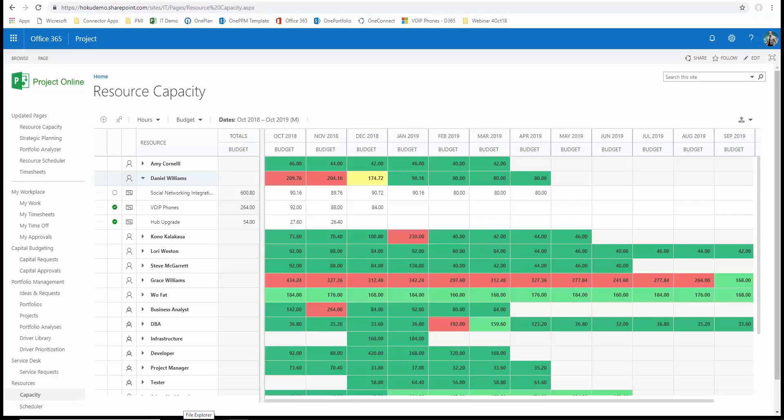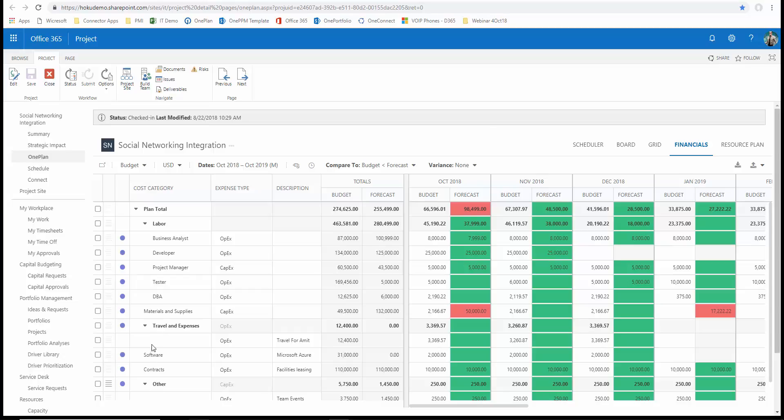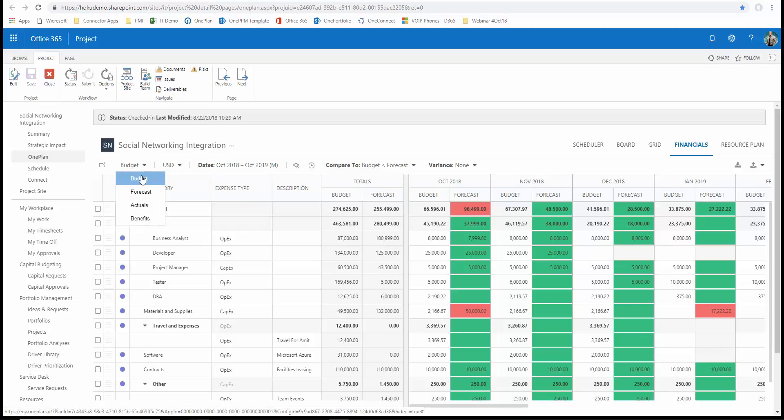To that, we also can add financial planning. Here in the financial plan of OnePlan, we can actually do a lot of flexible, detailed cost planning and tracking within the solution. We have the ability to do cost categories, which allow us to track whatever level of categories and detail that we like. We have cost types, meaning we can track the budget, forecast, actuals, and even track benefits for benefits realization. And it's user definable if these need to be added to or changed for your own individual needs.